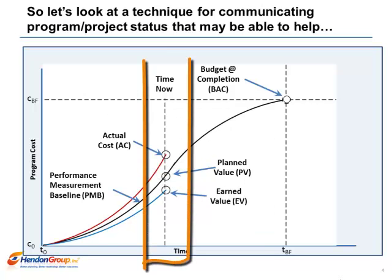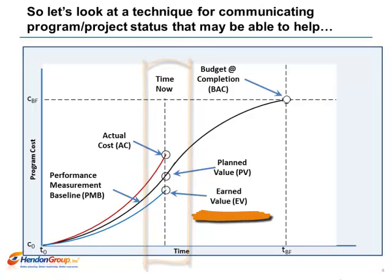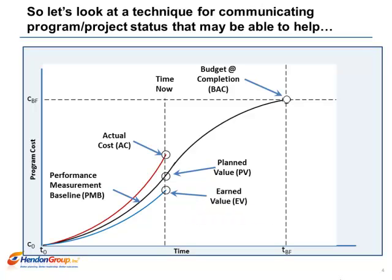However, the leadership team will not know if costs are out of line unless compared with the concept of earned value. Earned value is the cumulative value of the budgeted cost of the work performed at a particular point in time. This is illustrated in the EV curve.